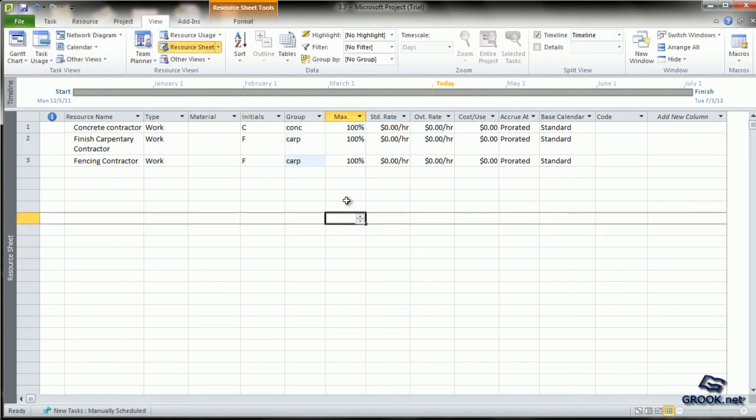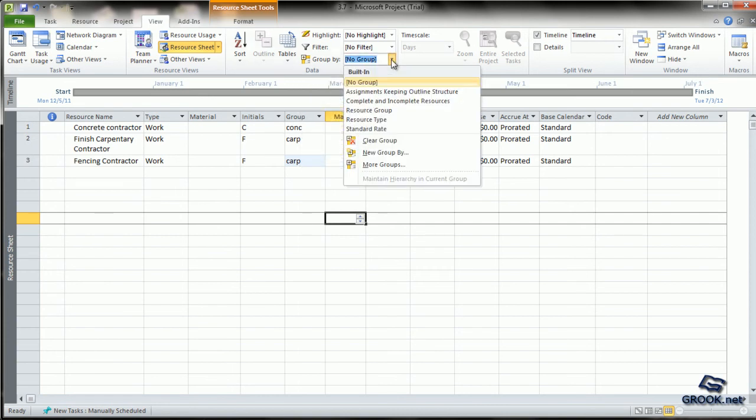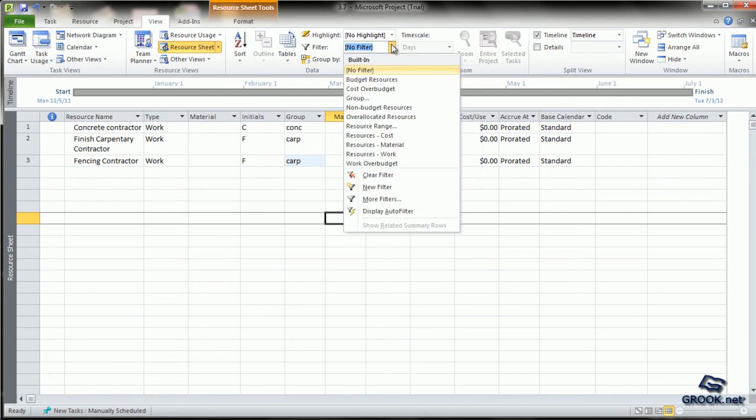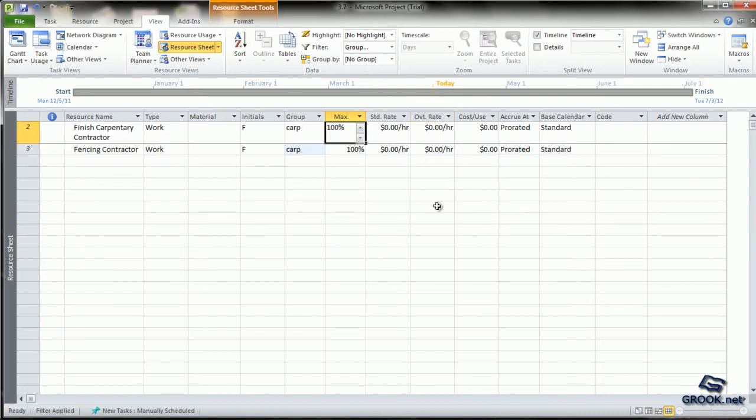The advantage is that when you have too many resources, you can view them by the group. You can go to filter and you can filter by group. You can provide a group name and only those will be shown.